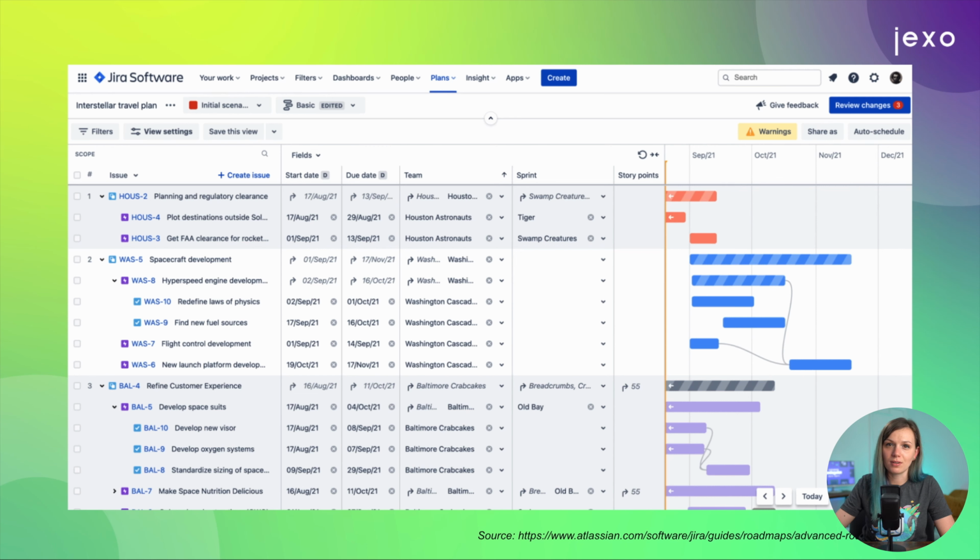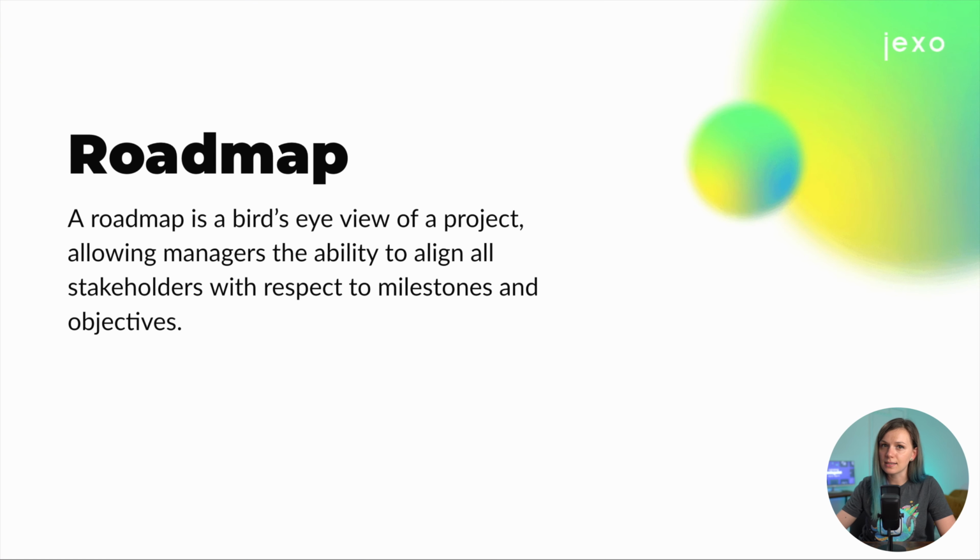Now, don't get me wrong, Gantt charts aren't for waterfall projects only. While there may be simpler ways for visualizing Agile projects, Gantt charts can be used in Agile too. However, the way Gantt chart present and track project plan easily encourages micromanagement. And that can ultimately kill your autonomous teams, as I talked about earlier. While using Gantt charts, we often tend to schedule from the initiative level to the single task level, which means that the plan soon becomes outdated and therefore they are hard to maintain. On the other hand, there are roadmaps.